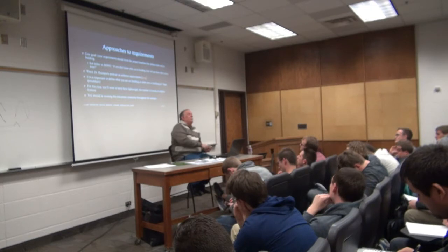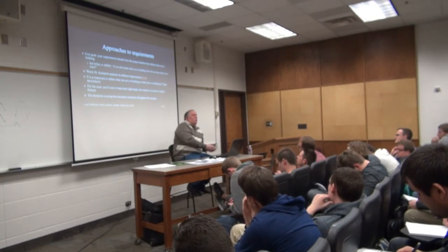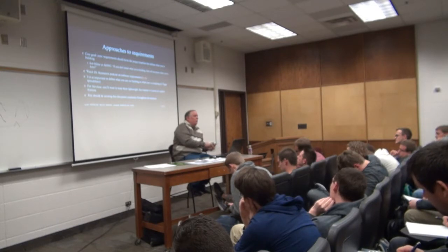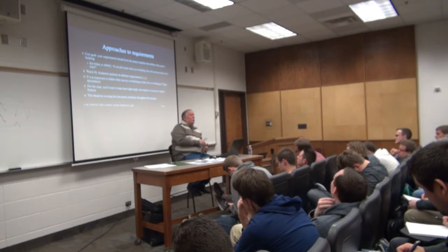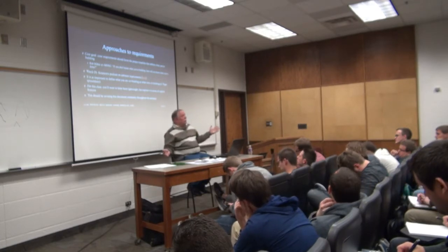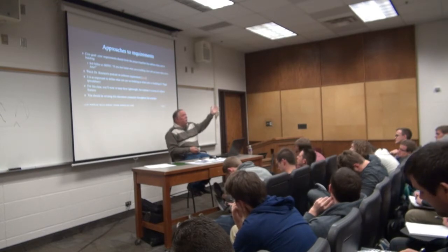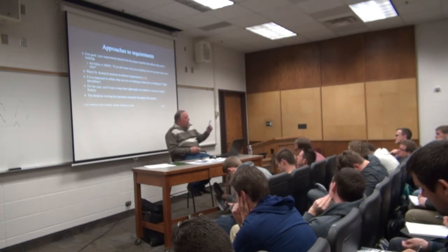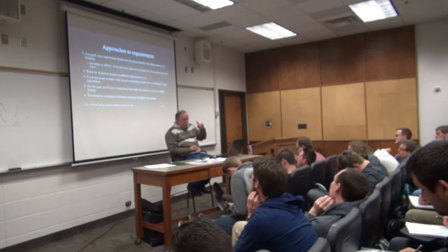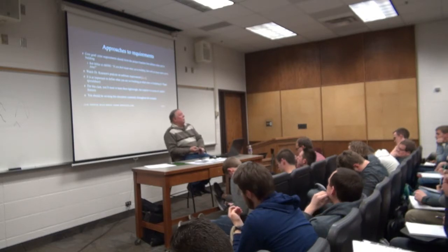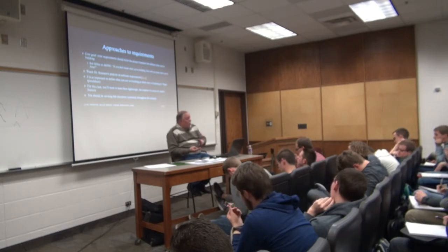At Pages, again, one of the things we did after we closed on venture funding, got our permanent CEO, and so on and so forth, is we made a spreadsheet. It's basically we researched every desktop publishing and word processing product out there and made a spreadsheet of 600 plus features. And then for each and every feature said either this is going to be in the product, this may be in some future version of the product, or this will never be in the product.